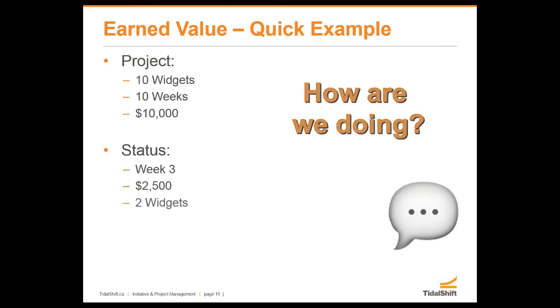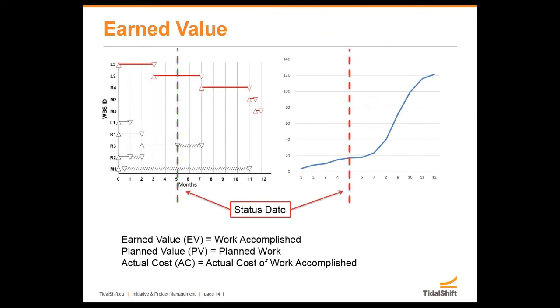So you really need to carry it back to how much work you've accomplished, and that's where understanding your percentage complete, and when you're actually going to do the work, whether you're on schedule or not, gives you a meaningful comparison. It's an interesting concept, but you don't need to actually run the numbers. What you do need is this S-curve, because the S-curve will tell you where you should be from a costing perspective. You compare that to what you've actually accomplished on your Gantt chart.